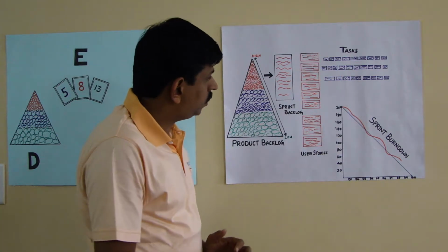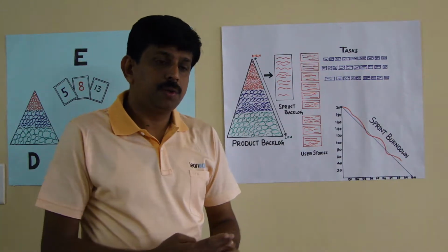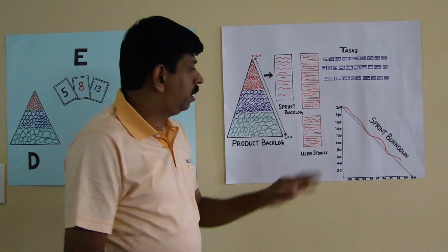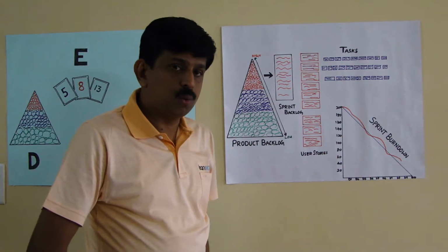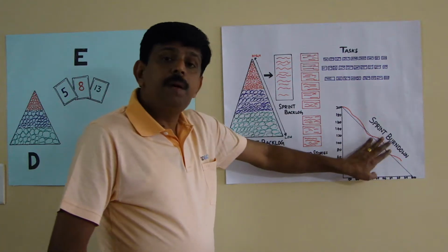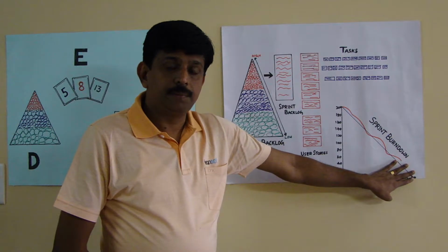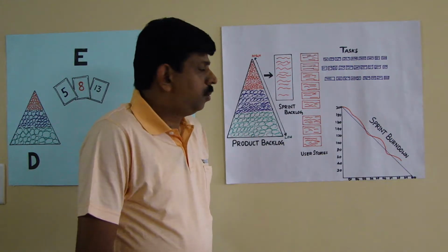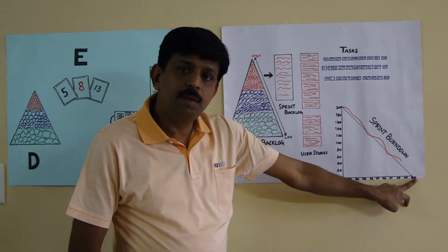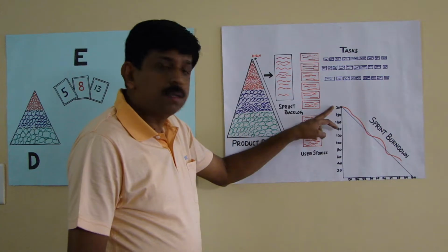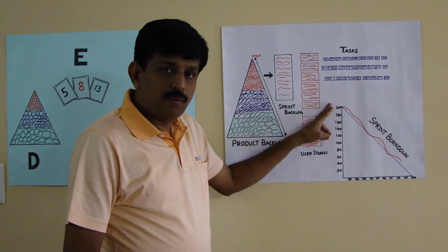Yeah. Now let's assume the 2-week sprint is done, the planning is done, and the team is getting into execution. How do we track the sprint, so that we are on track and we'll be able to complete this work in the next 2 weeks? Right? The sprint burn down, the third artifact, really helps in measuring that. Sprint burn down is like, if you see the x-axis, it is like day 1 to day 10. It is because it's a 2-week sprint, and capacity is like 200 hours. So we should be burning the 200 hours of effort.